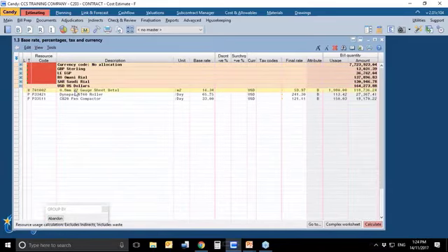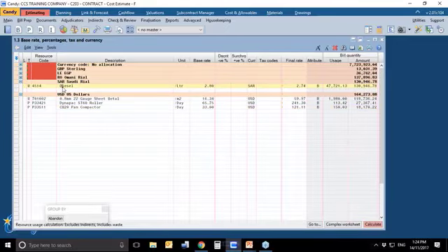So here I'm buying my sheet metal in US dollars. I'm adding my roller, my Dynapack roller and my pan compactor in US dollars. I'm buying the diesel in Saudi Riyal. Resource code is 4514. I'm buying it at 2.8 Saudi Riyals per M cube. The final rate is worked out to be 2.74 dirhams per liter. And Candy tells me that on this project, you're allowed to use 47,721 liters of diesel. That is the total quantity of diesel allowed on this project.